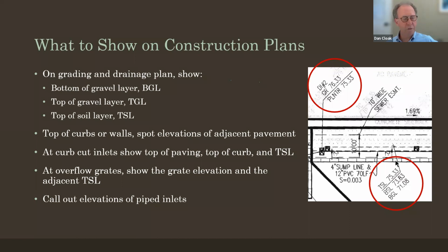And then when these are installed, you've got somebody walking around with the rod, getting the beep and showing that each of these are installed at the elevation that they should be. And so this is a way of taking it from the concept that we were talking about with the different design professionals working together and developing the concept, the engineer identifying, okay, it's going to be this flat thing and it's going to be here and it's going to be this footprint.